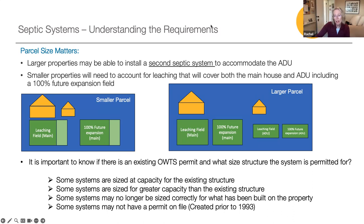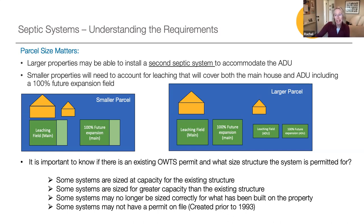Some systems won't have a permit on file at all, particularly if they were created before 1993. A site evaluation will be needed to determine the type and size of system you have, in order to determine the type and size of system you need to allow for the development of an ADU.